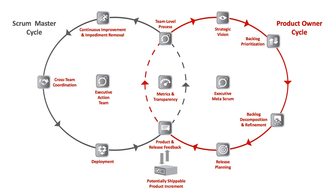Scrum of Scrums Master (SOSM): the Scrum Master of the Scrum of Scrums is called the Scrum of Scrums Master (SOSM). The SOSM is accountable for the release of the joint team's effort and must make progress visible, make an impediment backlog visible to the organization, remove impediments that the team cannot address themselves, facilitate prioritization of impediments with particular attention to cross-team dependencies and distribution of backlog, improve the efficacy of the Scrum of Scrums, work closely with the Product Owner Team to deploy a potentially releasable product increment at least every sprint, and coordinate the team's deployment with the Product Owner's release plans.